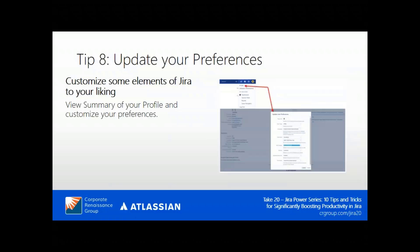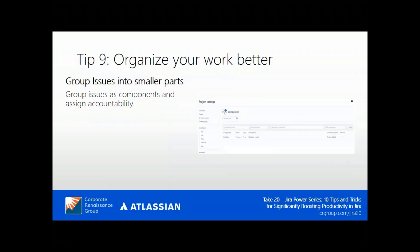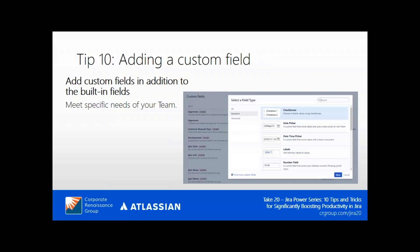Tip eight: how to update your preferences — you can customize certain elements in JIRA to your liking. Tip nine: organize your work better using components. You can group issues and assign accountability to a component lead or project lead, organizing by areas such as user interface or database. Tip ten: adding custom fields. For very specific team needs that built-in JIRA functions can't meet, JIRA gives you flexibility to add custom fields.